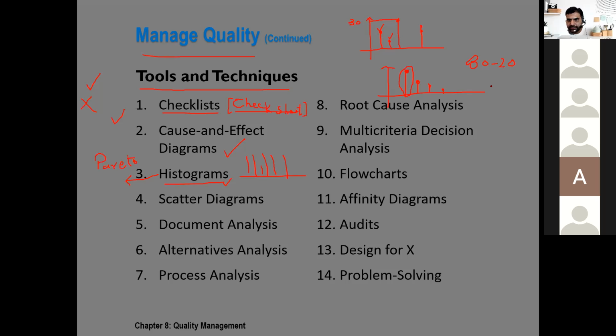In fact, it is even more than that. Here we also look at the aggregate of the issues. Then we see how much percentage is contributed by one type of issue. For example, 46% are because our doors are too wide, and so on and so forth.